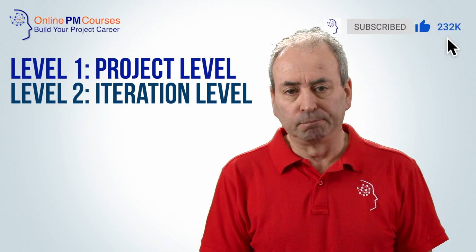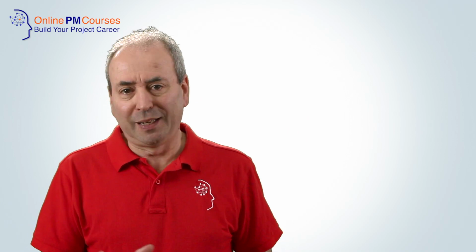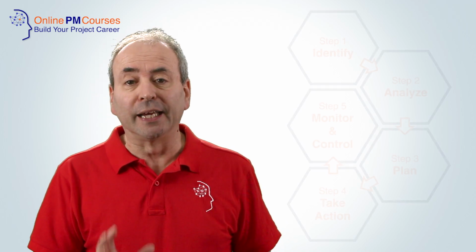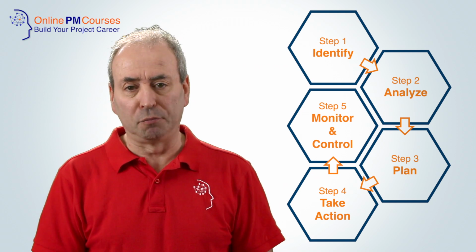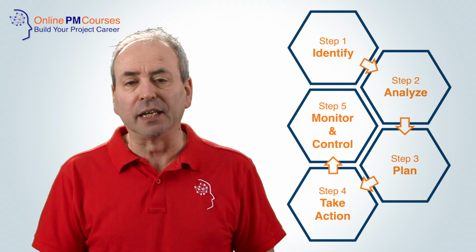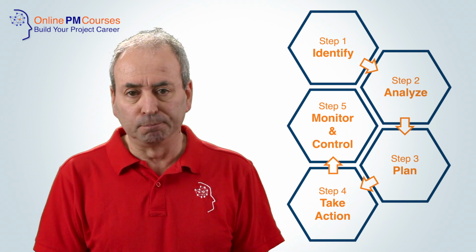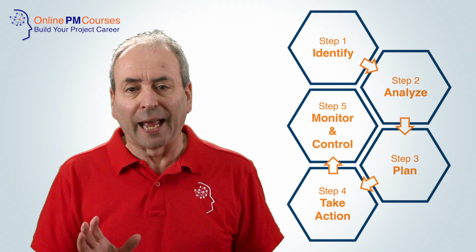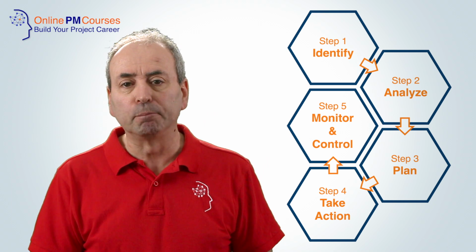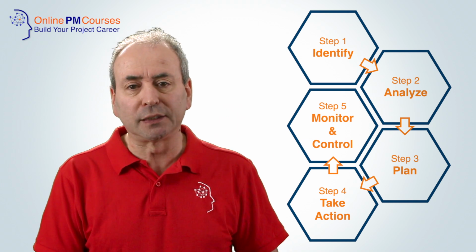The risk management process that we apply at both of these levels can be illustrated in many different ways. The way I like to explain it is as a 5-step recursive process. First, we identify the risks that we have, and then secondly, we analyze them so that we can understand and prioritize those risks. Third, we plan for how we are going to manage those risks to bring them to an acceptable level or remove them completely. And fourth, we implement our plan and take action to manage the risks.